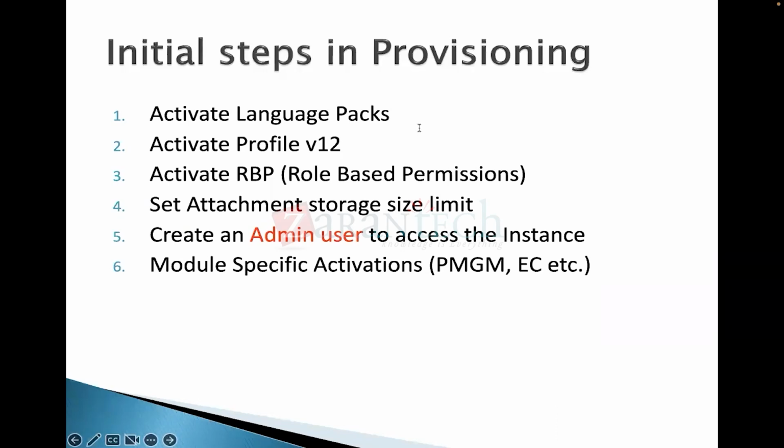This development goes for 5-6 months. So you will release the product for testing somewhere in next March or April. Then you will raise the request for the quality system. So now itself you need not raise it for that. Once the testing time has come, somewhere in March you raise it, and after 1 month from then, when you need the access for production, then you'll raise it for production. At that particular point of time, you will raise it. Every time they give you the provisioning of that particular environment.